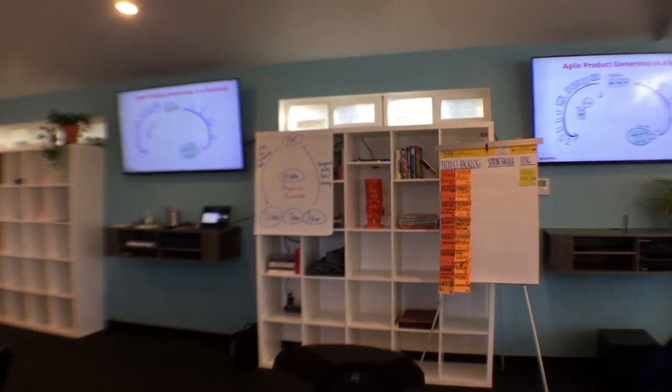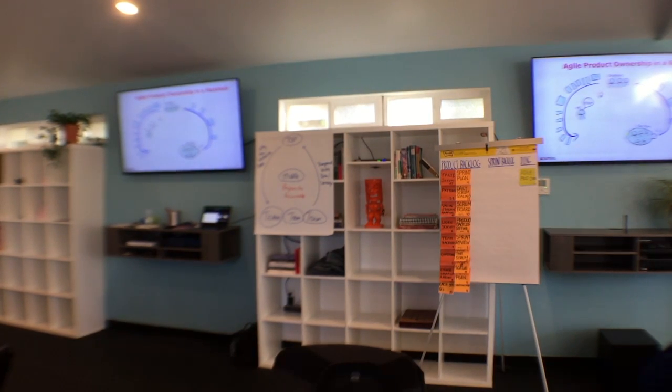They have lots of ideas and lots of wishes, and every time we deliver something to them, they'll get even more ideas and ask for even more stuff. So what happens if we try to please them, try to do everything they ask for? We'll get overflow. Suppose the team starts working on 10 new stories per week. If the input is 10, and the output is 4 to 6, the team will get overloaded. That will cause multitasking, demotivation, and all kinds of bad stuff. And ultimately, it'll lower output and lower quality.